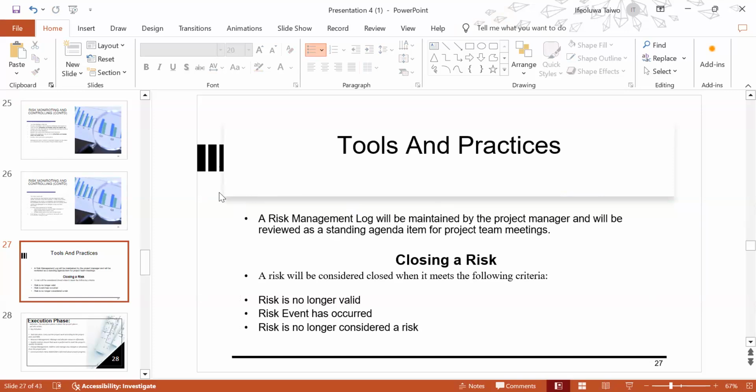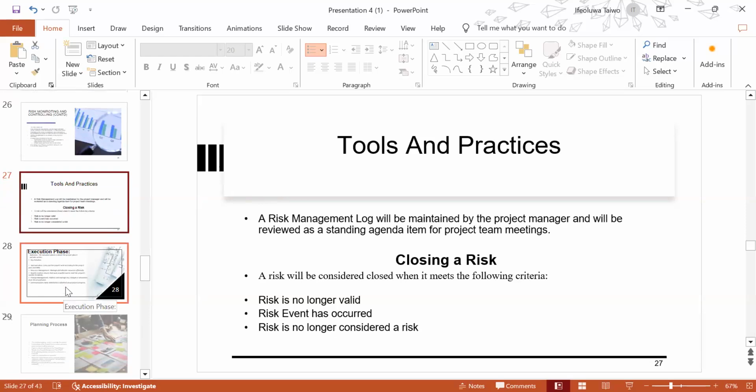So a case in point might be an engineer saying that he's planning to leave, and then you are eventually able to speak to that engineer, and he says, look, okay, I'll be able to finish the project with you. That risk no longer exists because you guys have sorted it out, and then probably extended his contract or gave him more money, depending on whatever it is, right? And then if that risk is no longer valid, you can close that risk and say this risk was closed based on three actions that we took.